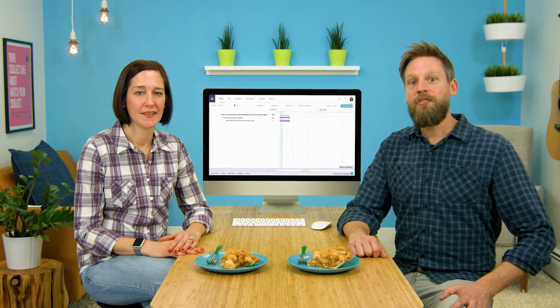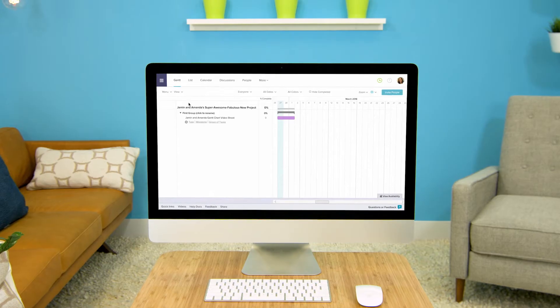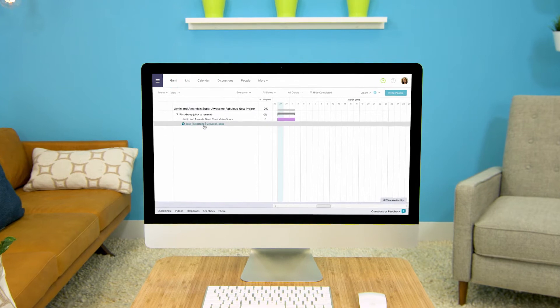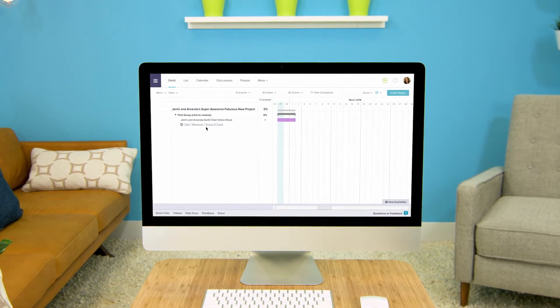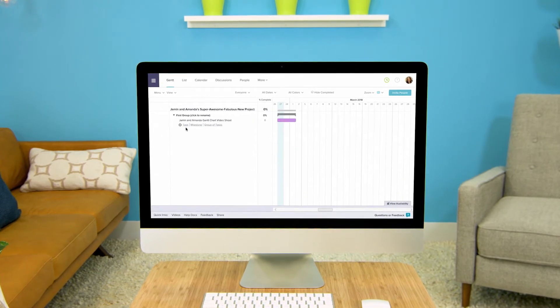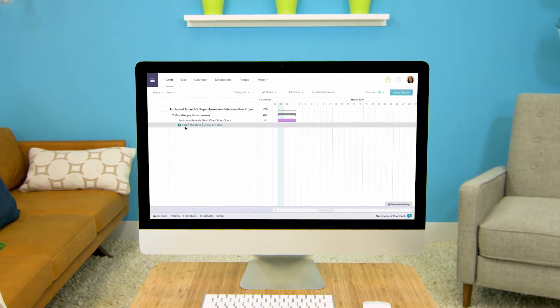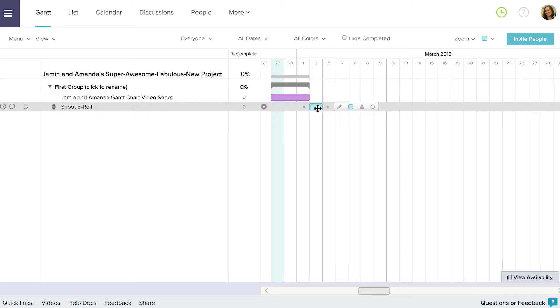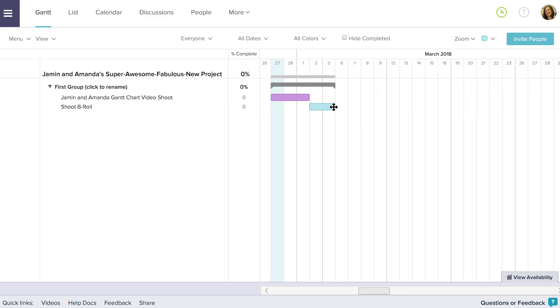To add another task mouse over the column with your task's name and under your task will be some options of things you can add to your Gantt chart. Click on add task and a new task is added. Name your new task and drag it into the timeline to schedule it. Once again you can resize the task to adjust its duration.